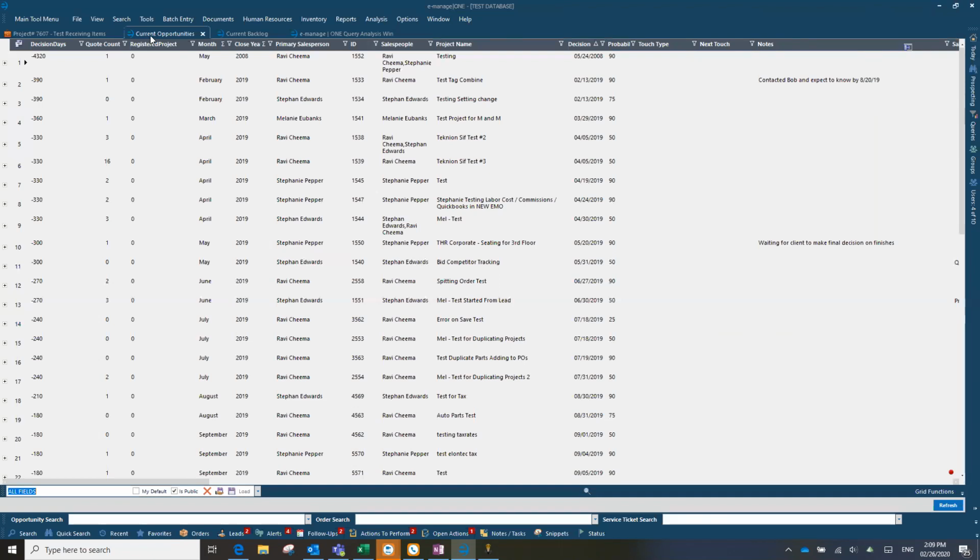You know that you can do add-on product, a punch list, or just additional project work, and you want to keep it all under that one umbrella. You don't want to create an additional project for each punch, change order, or add-on order. If it's part of that project, it should stay under that one umbrella for costing purposes and for time saving.